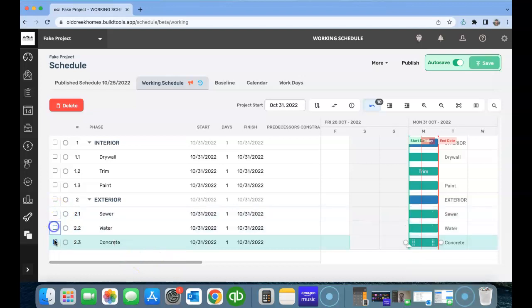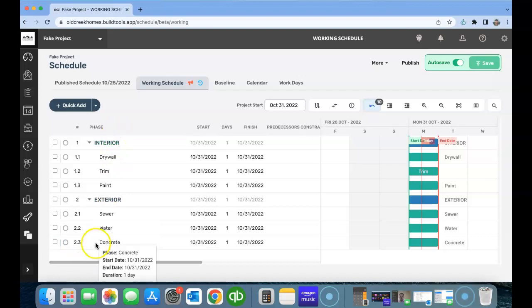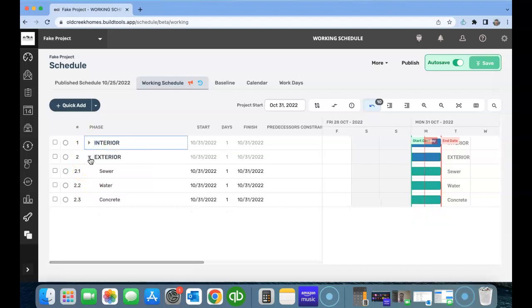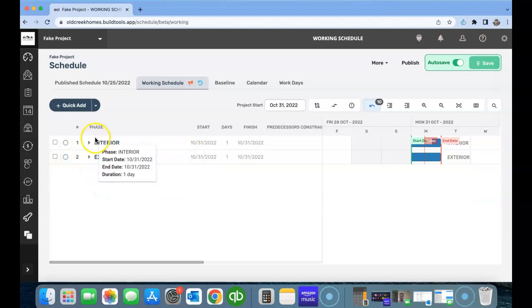Because when these schedules get pretty complicated, when we first start a project, it's 12 to 14 months long, and we have a lot more categories. So we want to clean these phases up so we understand how long each phase is potentially going to take. So when we first start a house, or any project for that matter, could be apartments as well, these are going to be broken up into about 7 different phases, from design, permitting, bidding, and then construction, and so forth.